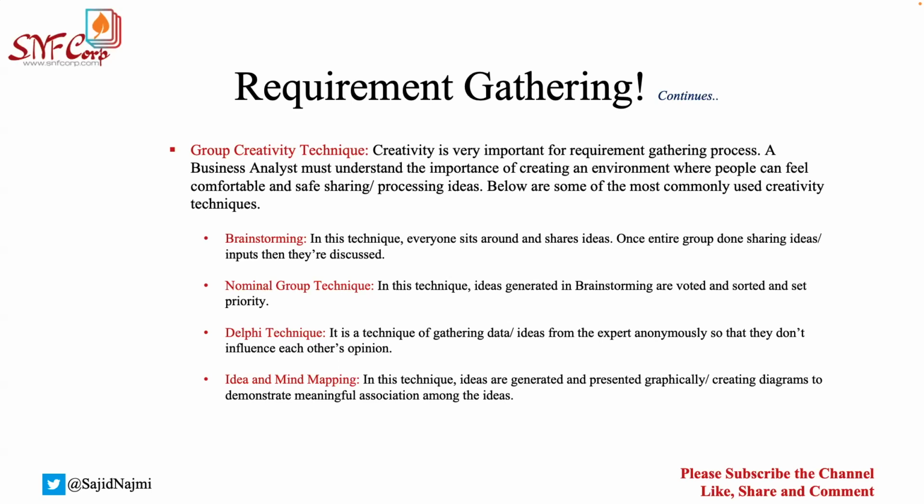So in nominal group technique, you all together try to prioritize and vote. Everybody will be voting together. Let's say you got 10 ideas. Out of 10, you have decided that 4 are things that can be done differently and improved. Out of 4, we have to take only 2. So which 2 should we take into actual action?